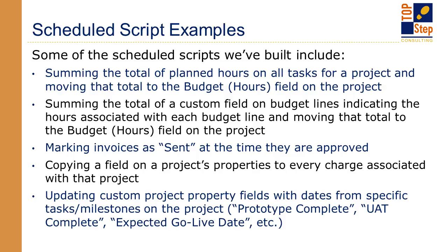Some of the things we've done for some of our clients just recently, in fact, one of these I just finished yesterday. One of the things we did, people at this particular customer were filling out the planned hours on their tasks, and they wanted the budget hours field on the project to match what they put in on the planned hours field on the task. Well, what they were having to do was go into the tasks and put their planned hours and do their project management at the task level, and then go back and sum all of those up, by hand or through a report or something, and then go enter that into the budget hours field on the project.